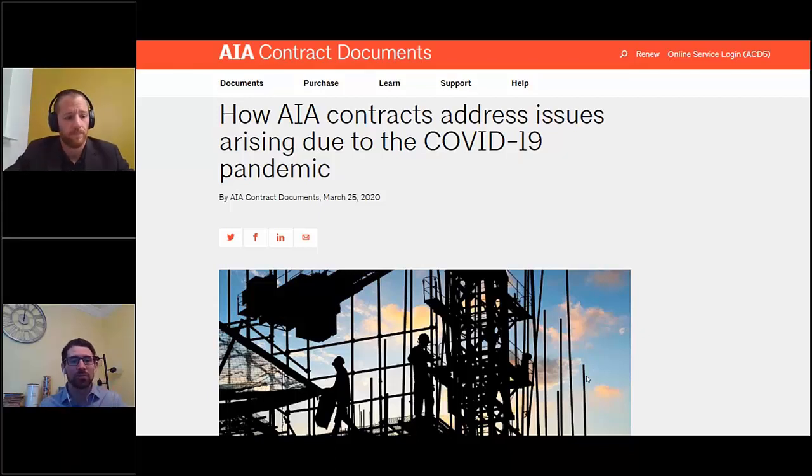So I think that 8.3 has the phrase in it, an unusual delay in delivery. So a delivery delay certainly is the kind of thing that 8.3.1 anticipated as a potential basis for a delay claim. For this one, I need to know a little bit more about the delay itself.